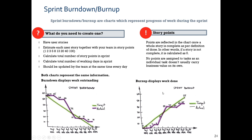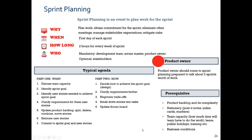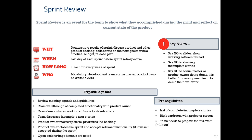Daily standup: why, when, and how long — 15 minutes is the maximum time limit. Sprint planning has part one and part two. Sprint Review: say no to slide shows — show working software instead, because the focus of Agile is working software. Say no to showing incomplete stories — show only complete stories, because stakeholders will measure you on incomplete ones and ask difficult questions.